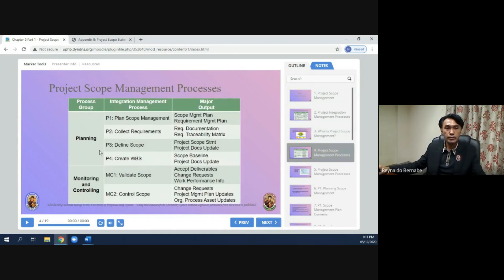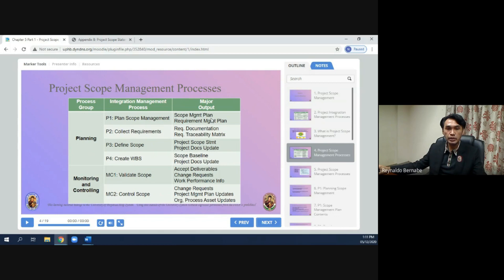In the planning phase, there are four sub-phases. Phase one is plan scope management, and the output of that is the scope management plan and the requirements management plan. Phase two is collect requirements, and the output will be requirements documentation and the requirements traceability matrix.